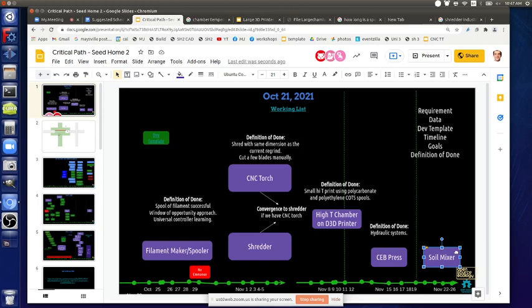When I say 1 day, I mean a long day into the night, like 8 a.m. and then some people are still around at like 11 p.m. finishing up. So in practice it means 2 days for a normal person. So think of it as 12 people over 2 days. Now, how many people do we have that are going to be working on it?